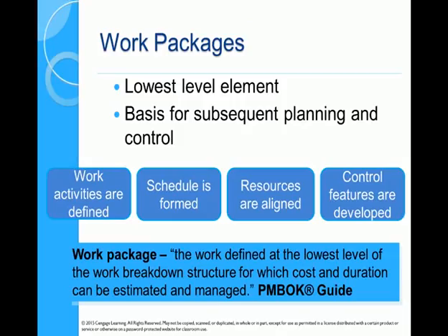So the work packages are to tell the people working on it what needs to be done. We also use the work packages to say when things are done, who's going to do those work packages, and finally how do we control, how do we keep track of the project. So really it comes down to this. Once you've decided what your work packages are, you then manage just work packages, and in aggregate you get a project.